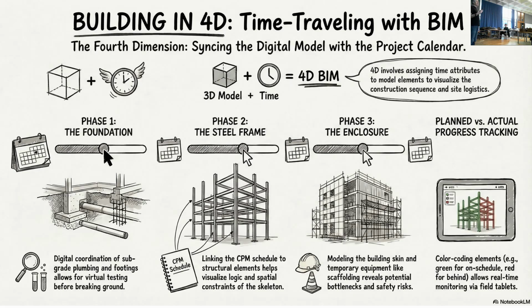And in that case, you say, I'm going to stop the traffic between 6 a.m. and 8 a.m. in the morning. I'll put these red lights, I'll put these people, and it's going to be finished by 8 o'clock, so it's not going to impact the city. Or I'll do it overnight at these hours. I will reroute the traffic between here and there at this day, at this hour.